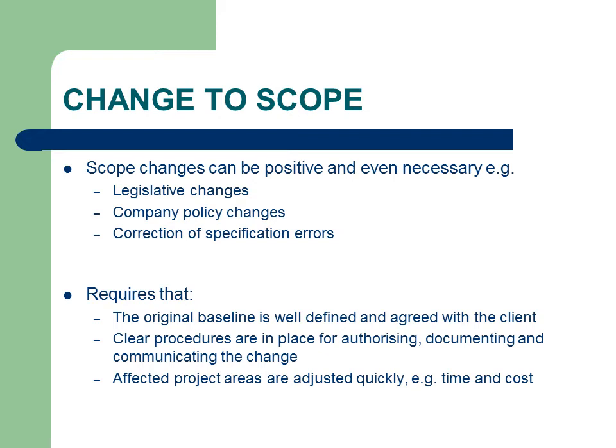Controlled changes to projects can be positive. Sometimes change is forced upon a project due to external events such as changes to legislation or company changes to products or operating procedures. Changes can also be internal to the project due to inaccurate specifications or technology issues. The important thing is that these types of changes must be controlled through the application of predefined and approved change control procedures, which are applied against the originally defined scope and specifications. This is also called a baseline.